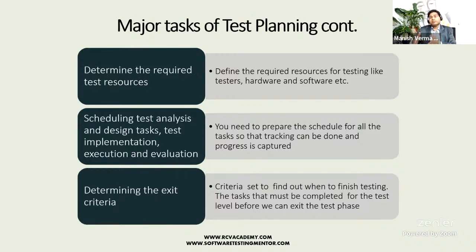And then this is the high level timeline by when we need the build, so that we can go ahead and test it properly, right? So usually in software, in Scrum, you will be getting that incremental build anyways, right? But then still there will be a high level plan. So for example, you are not going to release every sprint in production. So usually the releases happen in 2 months, 3 months as well, right?